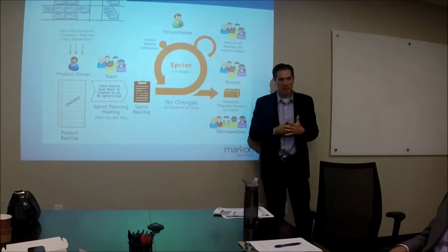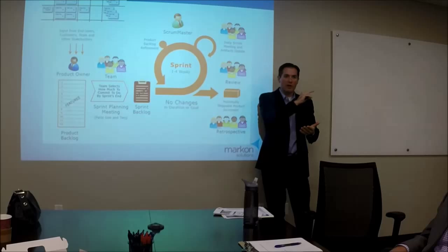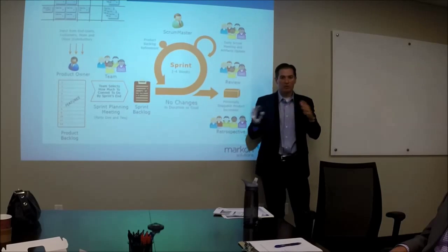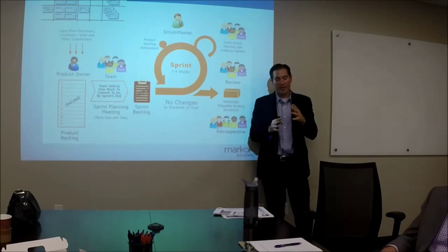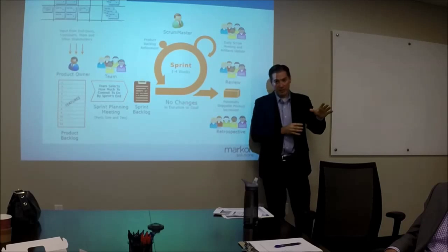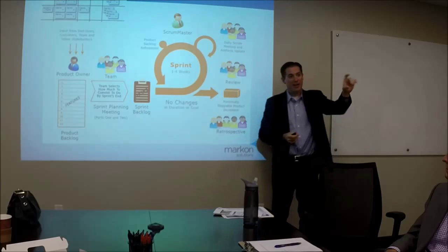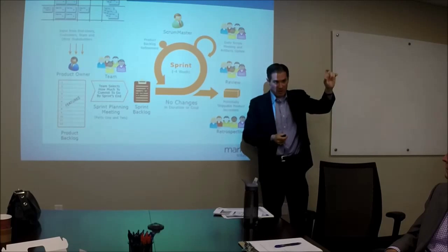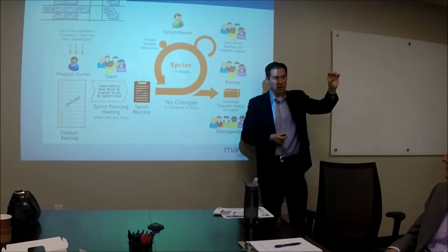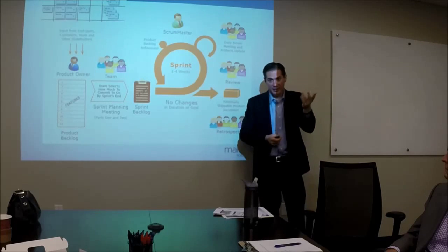They do overlap some, but what you don't have is, I didn't get task 156 done, so I can't start 157. We try to break that mold. Do those types of hierarchical tasks take place? Absolutely. But how do you not do it that way? We just have one card. If 156 and 157 are so tightly correlated, that should just be one card. Get those two things done. I want to watch that move from to-do to doing to done.